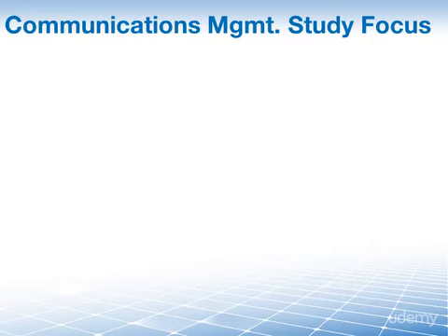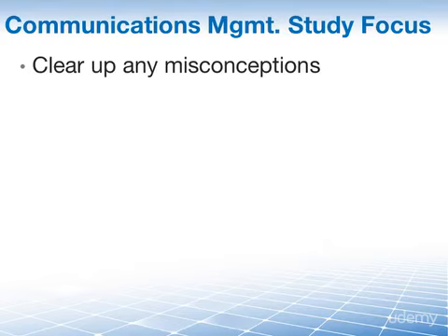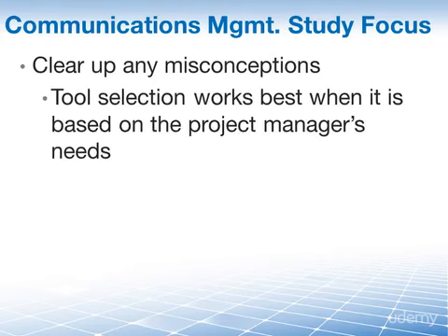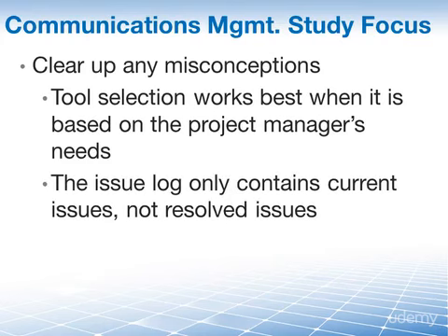Before you take the PMP exam, you have to identify and clear up any misconceptions that you may have about project communications management. Here are some examples of common misconception. Tool selection for project communications management works best when it is based on the project manager's needs. That is an incorrect statement. Tool selection works best when it's based on the needs of the stakeholders. The issues log contains current issues, not resolved issues.